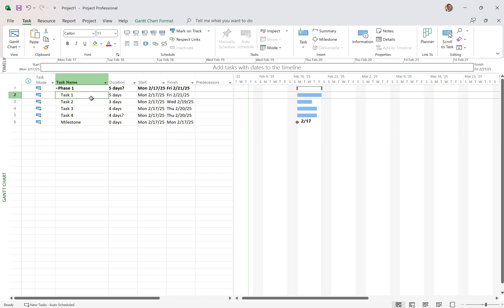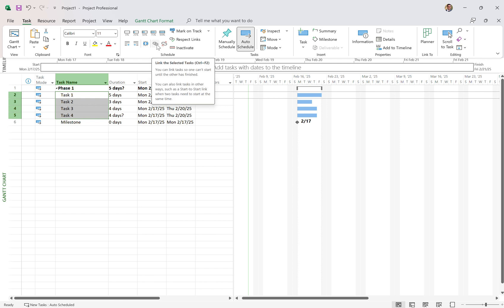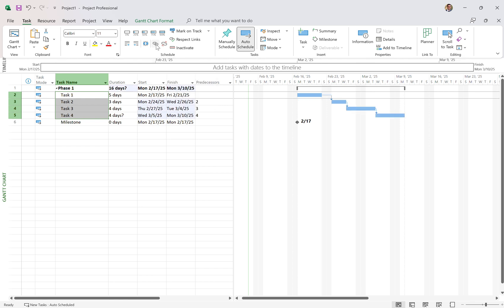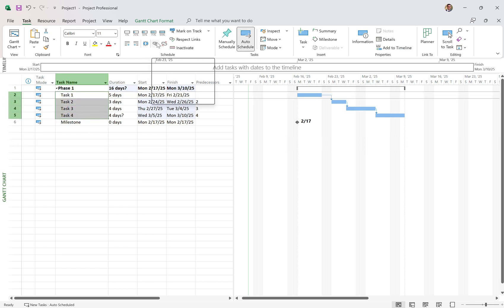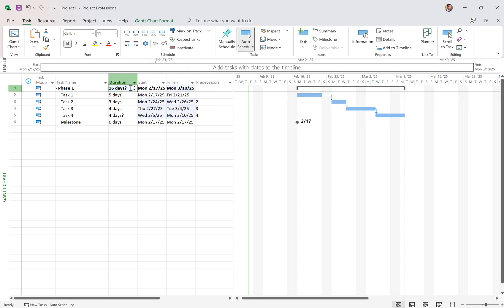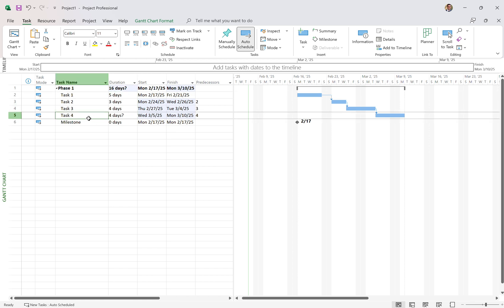Let's put that logical sequence in. I have another video on linking tasks called 'Linking Tasks in Microsoft Project' where I go into full detail. But select the tasks in a row, click Link Tasks, and you'll see they're all now linked. My project duration is now 16 days, which is the sum of the tasks within it. I'm also going to link Task 4 to the milestone — so once Task 4 is completed, we'll know our milestone date of the 10th.